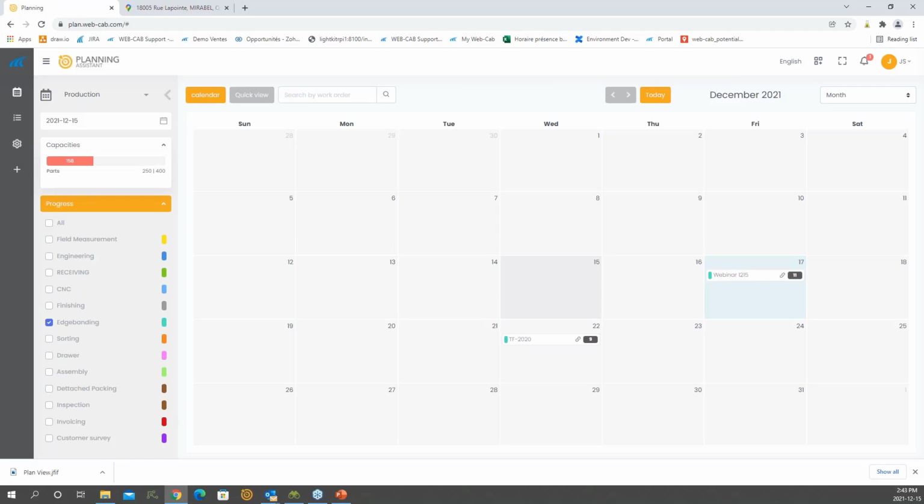And of course, there is, I don't know if you want to call it a delay, but dependencies before things can happen. For example, with Production Coach, not only do you need PCs, you need scanners, printers, a number of those things that all have to be connected. And generally, Production Coach also involves an on-site integration. So that would be one good one.